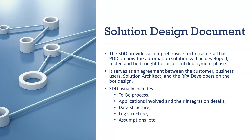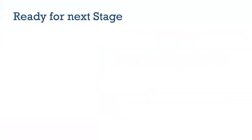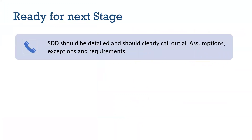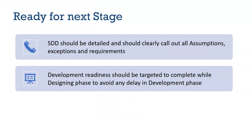We'll have a detailed video prepared on what is the Solution Design document and how to prepare it with a live template showcase — you can refer to that for more detail. For now, once the Solution Design document is prepared, we are ready for the next stage. The basic elements are: the SDD should be detailed and clearly call out all assumptions, exceptions, and requirements for your solution to get developed and delivered. Development readiness should be targeted to complete within the designing phase itself, so that all application access, infra, licenses, and system readiness are sorted before the design phase ends, allowing development to start without any delay.